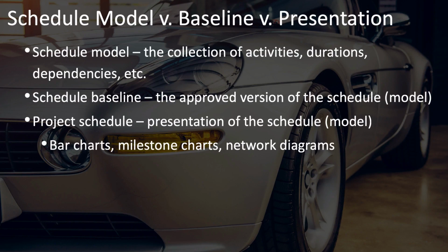The schedule baseline is the approved version of the schedule, specifically the schedule model. When you refer to a project schedule, you're actually not usually referring to the model, but you're referring to a particular presentation of that schedule model. A presentation in the form of bar charts, Gantt charts, milestone charts, network diagrams, or what have you.